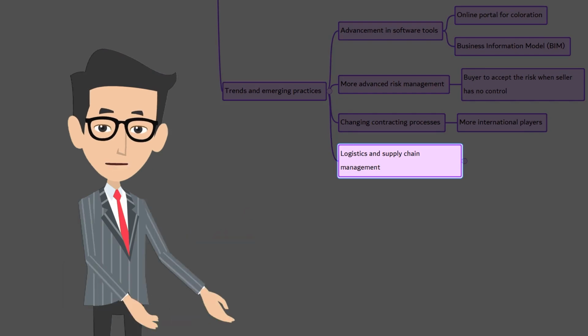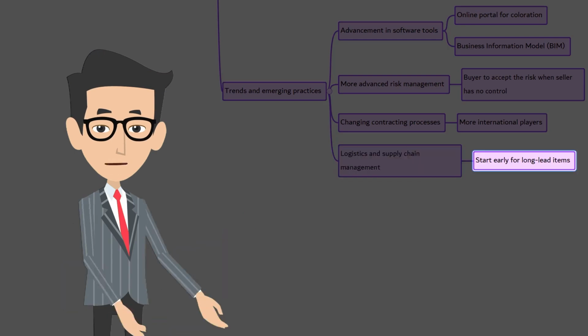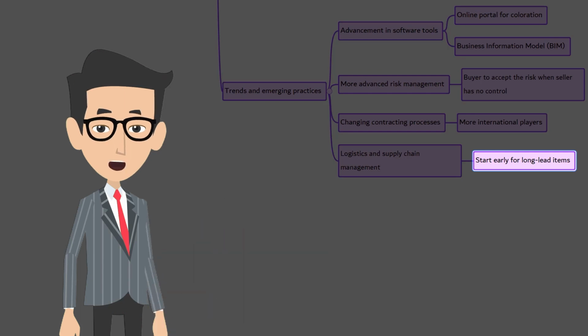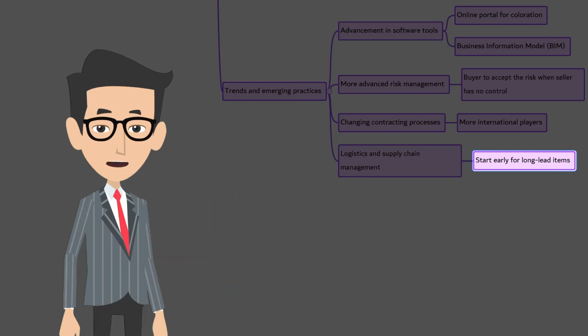But on the other hand, there are items that may take much longer to procure. For those items, the lead time is not in months. It can sometimes even be in years. So, the contract starts when the high-level requirements are identified at the top-level design. Normally, when an international contract purchase is involved, a minimum percentage of material is bought from local vendors. This reduces the cost of the material and also the cost of logistics and supply chain. Along with that, the risks get minimized.